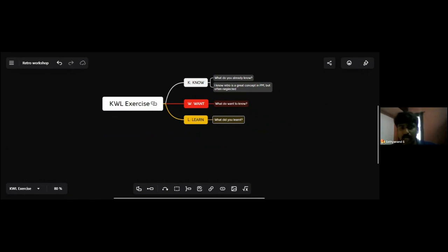I have a file named weekly review, and I have those four questions. What were the wins? What were the fails? What could be improved? And more importantly, what should I stop or discontinue doing? Any mistakes I might have made or something like that. And I do this for each project: my creative projects, my workshops, my sessions. In fact, after the session, I'm going to do a retro of how the session happened. So that is what I do.